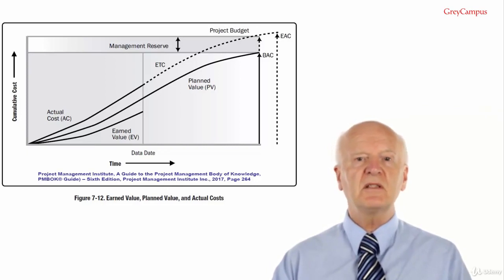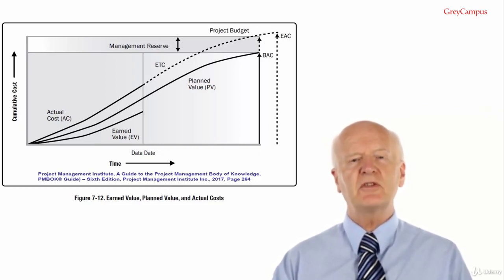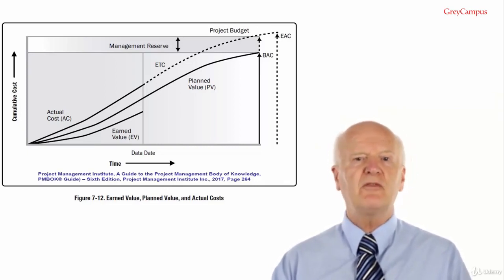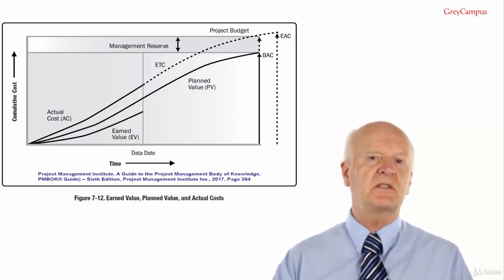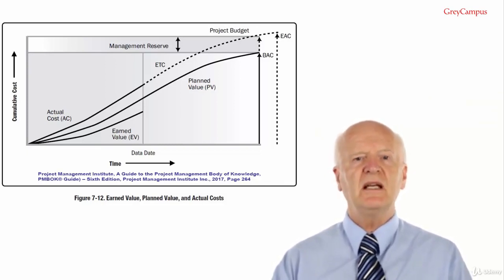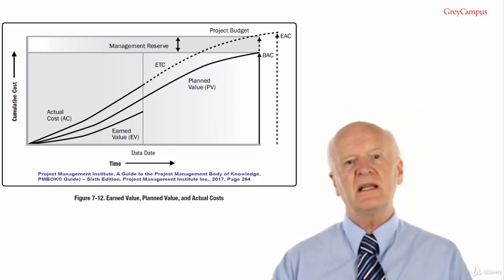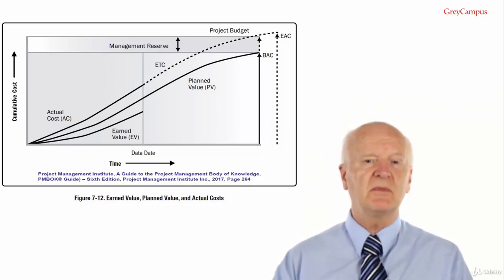Forecasting the estimated completion means a project manager and project team are predicting the future based on the past in light of current project knowledge, mainly from work performance data. So you get an increase in accuracy with this. The estimated completion is usually based on the actual costs incurred for the work completed, plus an estimate to complete the remaining work. And the most important technique is a manual summing up, bottom-up summation.